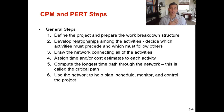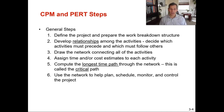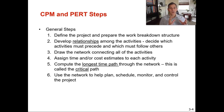Step five is to compute the longest time path through the network — this is called the critical path. The critical path is the longest time through the path, not the most steps or the shortest time. You compute that and figure out how long the project is going to take to complete. Step six is to use the network to help plan, schedule, monitor, and control the project — using the AON network diagram and its output to help control the project.